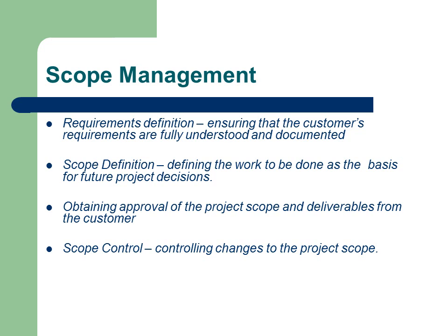Once the project scope has been defined, it is important that it be reviewed and approved by the project sponsor and any other key project stakeholders. During the execution of the project, it is inevitable that changes will be requested. However, project change must be well defined and controlled, otherwise the project will get out of control and may result in failure, or at the best, an unhappy customer. We'll discuss methods for controlling scope in Module 3.